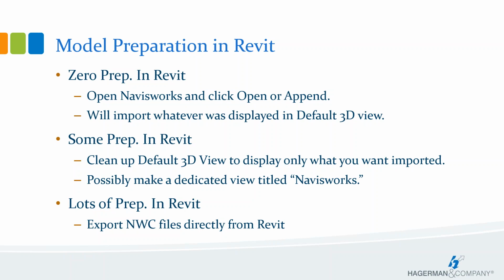You could also do this for different areas of the building, or even if you wanted to have separate NWC files for different building components. For example, I might have one Revit MEP model, but I want to have a different NWC file. Makes it easier for clash detection. Maybe I have different files for ductwork, cold water supply, sanitary piping, lighting fixtures, cable tray, and maybe one for conduit. So in that scenario, I had one Revit file, but could have multiple different Navisworks models.